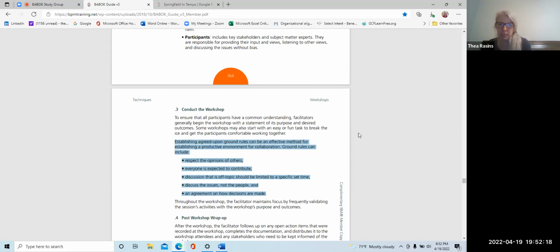Let me talk about the very beginning of the workshop. It takes probably 2 hours to get comfortable with a total stranger, and you're in a group of total strangers. So you need to have a couple of opportunities at the very beginning to not only plan on you doing almost all the talking, but have everyone introduce themselves, what their role in the company is, what their role in the project is, what their goals for this project are, what their concerns are. I would like for everyone to spend 3 minutes answering these questions and go around the room.